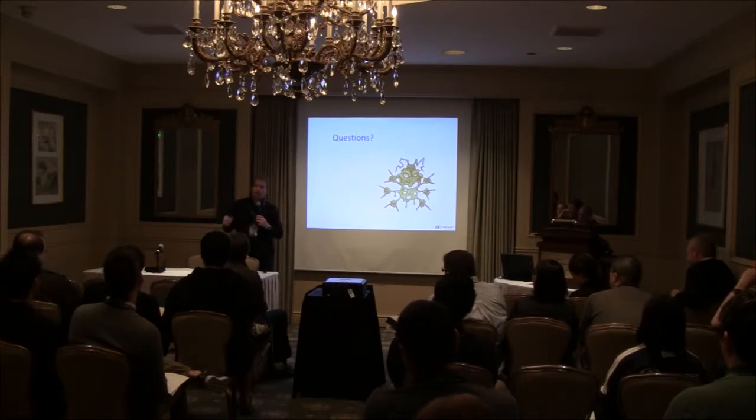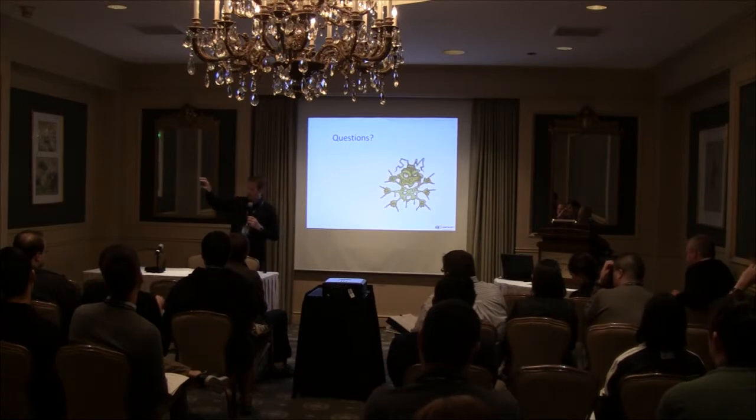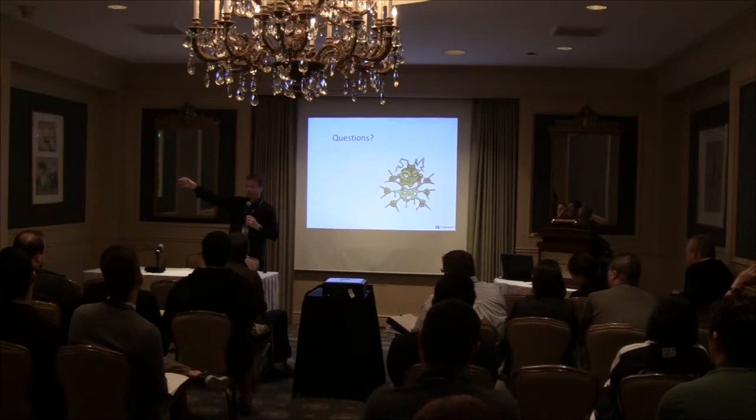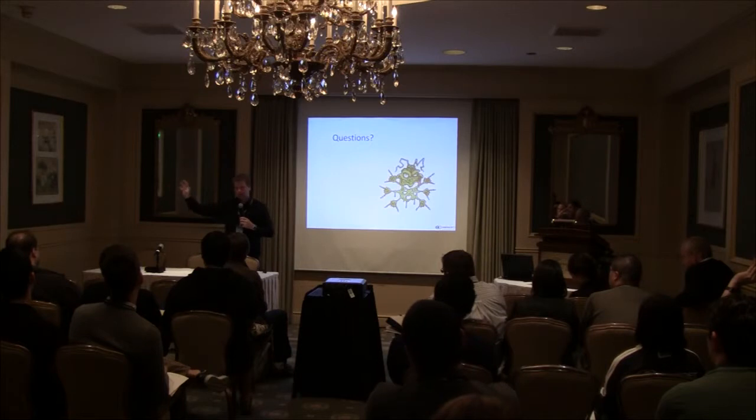You should start collecting metrics, of course, if you're not already, because that's where you're going to be able to say, here's an empirical piece of information: last sprint we created this many features, or this many hours of features, we generated this many bugs, we resolved this number of bugs in that sprint, and we lost this number of features.